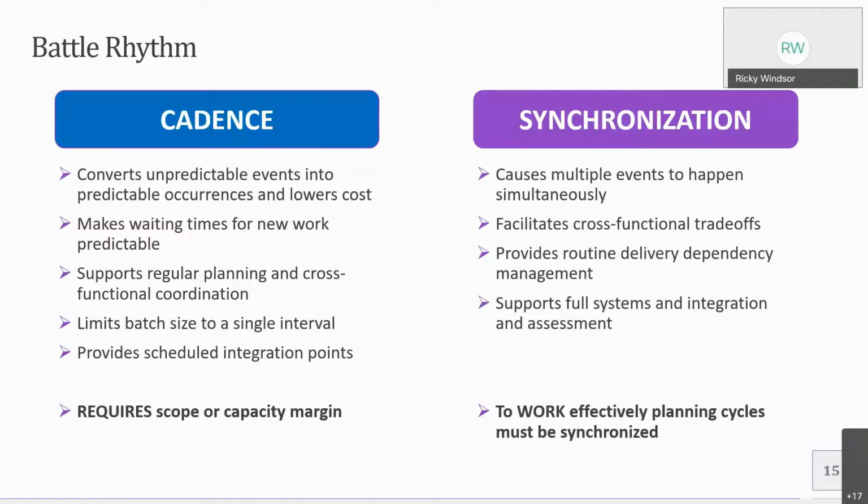Whether it's the risk assessment report, or an SSP, or the SCTM, or whatever those little pieces are. If you can chunk that into the smallest size possible, that allows you to increase the overall capacity and throughput of the operation to deliver the product.